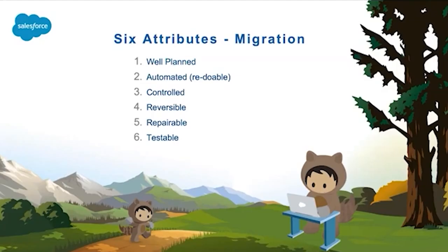It is always advisable to do a complete rollback rather than a selective rollback when it comes to data migration. This is based on our experiences in the past, because selective rollback is always complicated due to the dependency of other data. For example, if you are doing a rollback of a specific set of records in the account object, there may be some interdependency of the account object with other dependent objects, or even some logic written in the backend Apex level based on these account object values. There may be other objects that may be impacted as well. So it is highly advisable to do a complete rollback rather than a specific set of data.